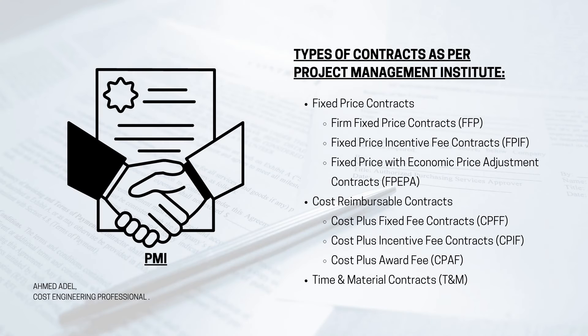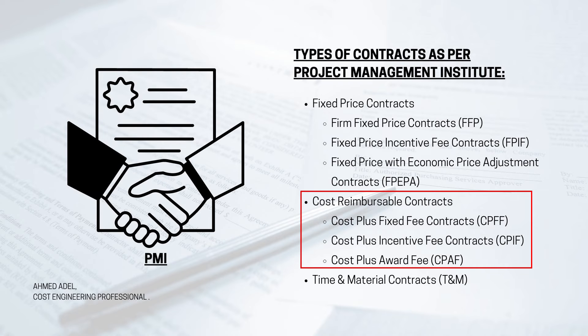Under cost reimbursable contracts, PMI identifies Cost Plus Fixed Fee (CPFF), Cost Plus Incentive Fee (CPIF), and Cost Plus Award Fee (CPAF). In Cost Plus Fixed Fee, the contractor calculates direct and indirect cost, and a fixed fee — either a fixed amount like 100,000 or a fixed percentage like 10% — is added on top. The fee is fixed regardless of the actual costs incurred.